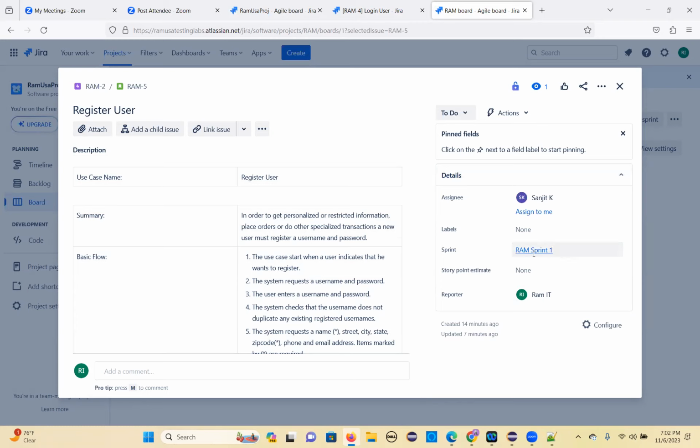Okay, story Ram Sprint 1. You can see story number, the estimate. So how many days you want? 10 days. So basically the story points, right? 0, 1, 2, 3, 5, something, 30, depending on how complex a story, a user story might be. So here you can include.